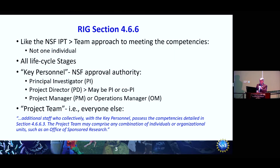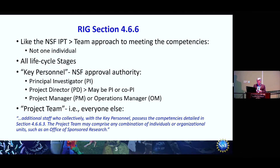Here's the summary of RIG section 4.6.6. It's exactly like how we do it at NSF for the NSF integrated project team — we take a team approach to meeting the competencies. This is how we've implemented PMIA, the Program Management Improvement Accountability Act. Unlike other federal agencies that expect the project manager to hold all the competencies, we don't expect the program officer, the LFO liaison, or the grants and agreements officer at NSF to hold all the competencies. Together as a team, they meet all the competencies. You guys manage the project; we do oversight. So we don't expect all the competencies to be held by one single individual.